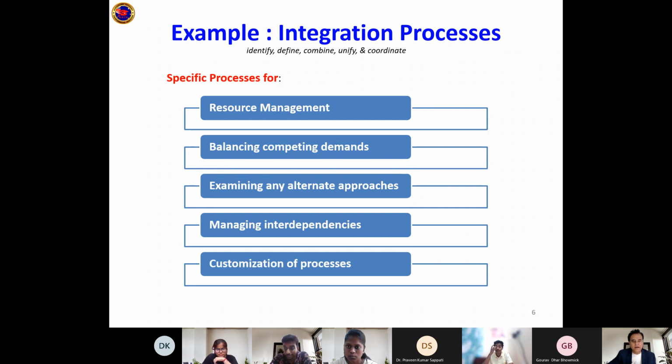So they're interdependent. You cannot start your work unless someone else finishes their work. This is called dependency. If we have time to do time management in great detail, I'll show you what dependencies are in project management. So Jaya gave a very good example of interdependencies while constructing.